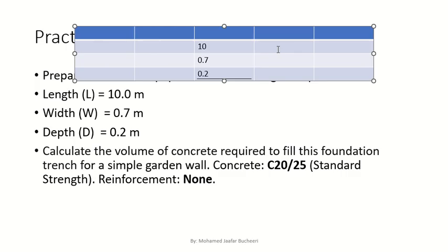Squaring column, okay? The squaring column was the product of 1 and 2. 1 has nothing, it's 1 because it's 1. And 2 is 10 into 0.7 into 0.2. How much? 1.4. You guys are not into calculators. I should trust you, right?